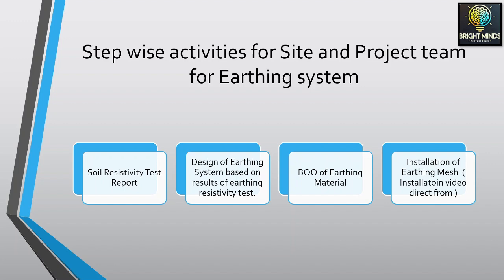The designer is a third party designer, who will not tie the knots of your systems. In Saudi Arabia and any Gulf country, the client has approved designing firms and agencies. They will give you this service as a paid service, and you will be able to get the design approvals from the client. It is not that any designer can come and submit his design to the client. So this designer is your key member for the success of the project.